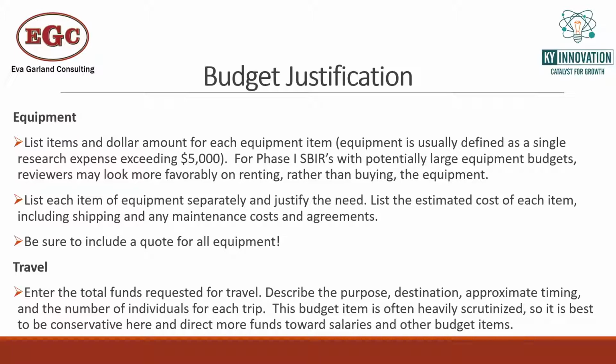If you're trying to figure out, oh, I need to drop another 4 or 5K to fill up my budget, travel is not the place I would put it, because that's such a heavily scrutinized category. It's better to up the personnel levels and be as conservative as you can on the travel budget.